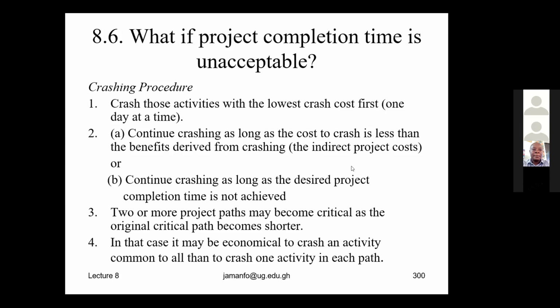Then we continue crashing as long as the cost to crash is less than the benefit derived from crashing. Remember to be guided by the indirect project cost and the permissible crash cost per day. Then we continue crashing as long as the desired project completion time is not achieved, until we have achieved it.